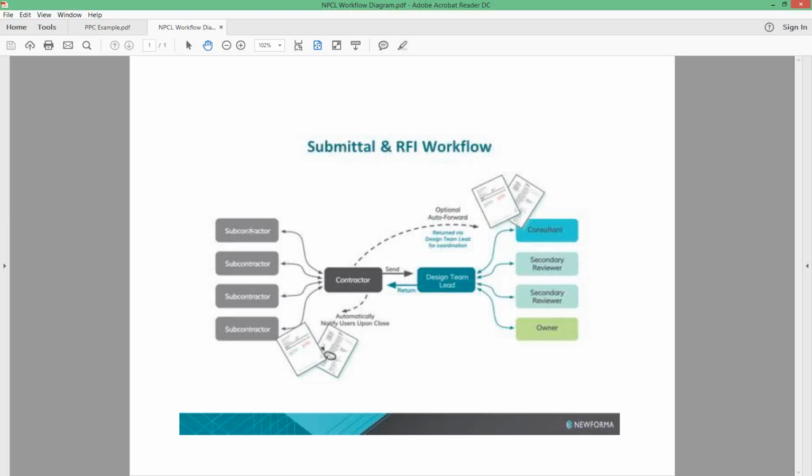So if you add someone to the team as a subcontractor, the electrical subcontractor is never going to be able to send something directly to the electrical engineer and get a reply. Even if the information is not incorrect, if they're the only two people in the world who knew that interaction took place, then that's an issue. So it's the relationships between the different points in the process that are set in stone.